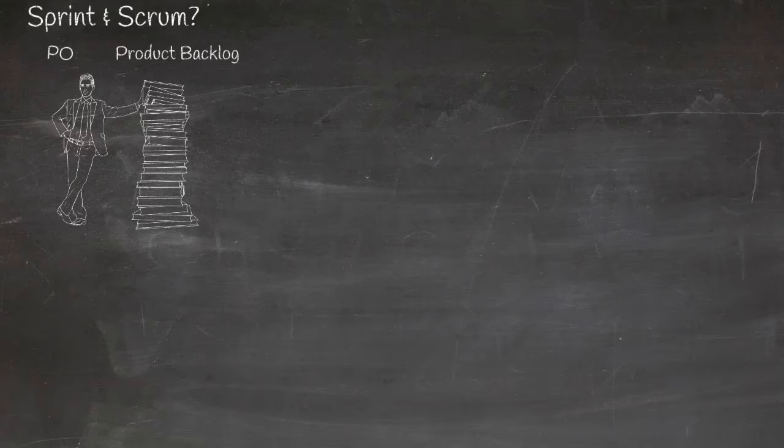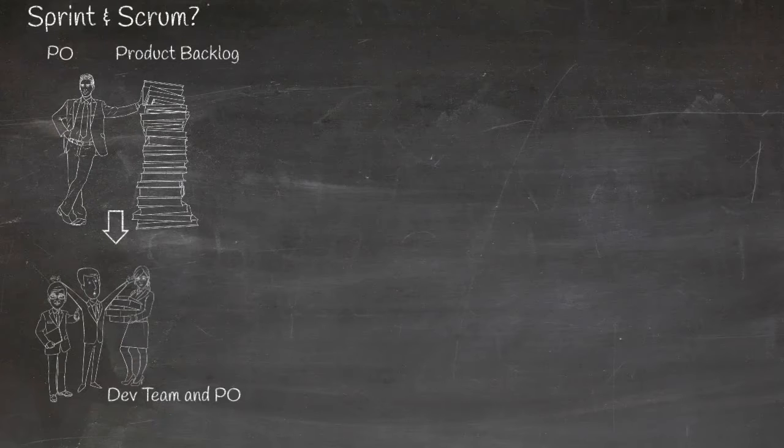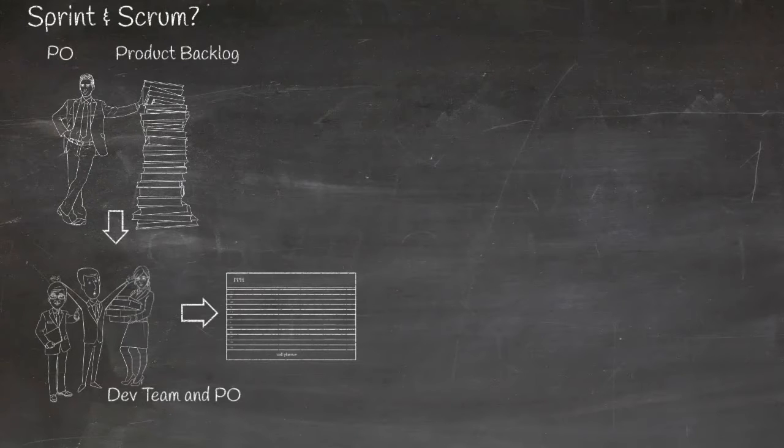As the sprint begins, the team meets to discuss the current backlog and select just enough work to create the value, but not more than they expect to finish completely during the sprint. The team also creates a rough plan on how they are going to implement these features. So, the team defines the sprint goals and the list of the work to do called Sprint Backlog.